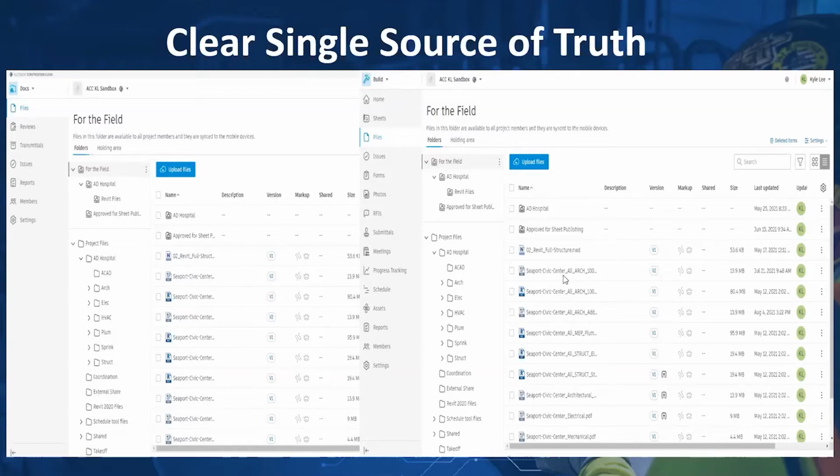We can also, as we look at some of the different file names over in the actual folder itself, we also see that we have versioning here that's built in. So I can see that we have version number 1 on some of these files, but some of these files are also version number 2. So again, as new information may be put out regarding that particular file itself, when it gets uploaded into the project, what it does is it creates a new version. We still have the ability to leverage and maintain previous versions, but it always brings that most up-to-date version up to the forefront. And when we click on that file, that's what we're looking at by default. So that's very important to, again, be able to ensure that we have that single source of truth that everyone on the project can leverage.